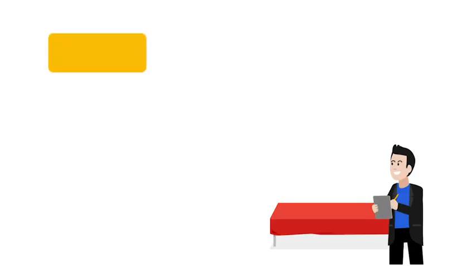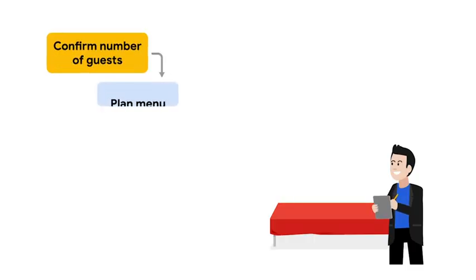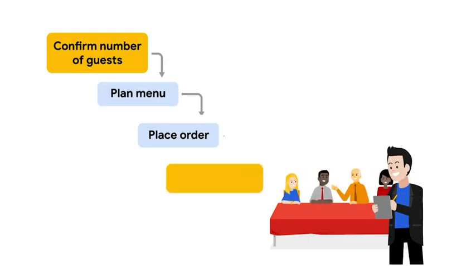Well, when the phases of the project are clearly defined, or when there are tasks to complete before another can begin, or when changes to the project are very expensive to implement once it's started. For example, if you were catering an event for a client on a very tight budget, you might want to use waterfall methodology. This way, you could confirm the number of guests first, then very clearly define the menu, get approval and agreement on the menu items and costs, order the unreturnable ingredients, and successfully feed the guests.